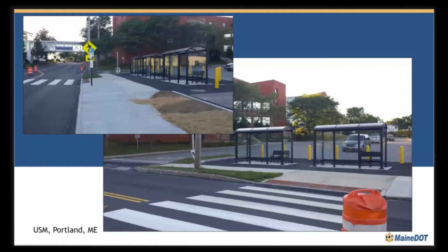Yes, right here. So this project we're talking about, the city was in the midst of a sewer separation project. So they basically were ripping up the entire road. And this was the binder pavement. We hadn't placed the surface yet, although maybe harder to see here, but there should be a little lip. And I think Teresa mentioned that temporary ramp is what it is. And you want to have those too, I know you know that, but if you don't put those in and you haven't done the final paving, you don't want people tripping over those.